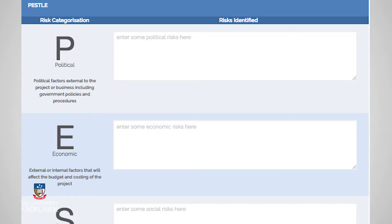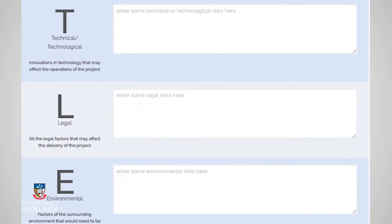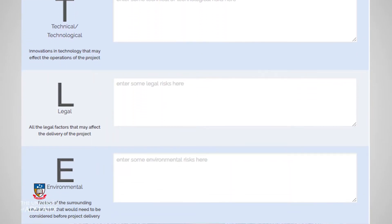As a project or risk manager, you should view the risk register as the key management tool for you and your team to manage your project risks. The layout of the risk register typically follows the stages of the risk management process. For example, by doing the Section 2 activities, you started by clarifying your project objectives and then identified the risks using a PESTL type template. Once you have this information, you can enter these risks in your risk register by describing the risk and assigning a PESTL risk category.